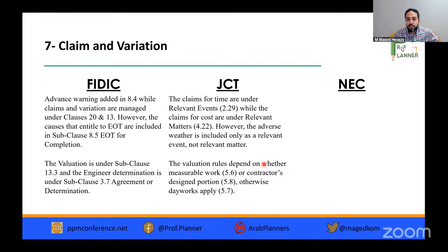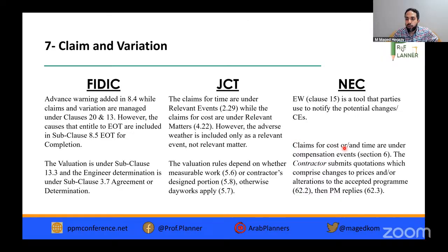The valuation rules depend on whether it is measurable work, contractor's design portion, or the day work clause. In NEC, we have early warning. Clause 15 is a tool for the parties to notify potential change or compensation events. Claims for cost or time are under the compensation event section 6. The contractor submits quotations which comprise change to price and or alteration to the accepted program.